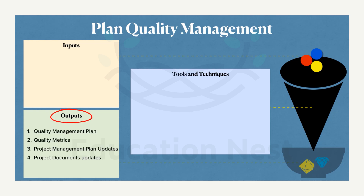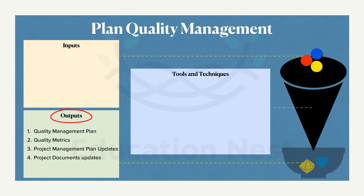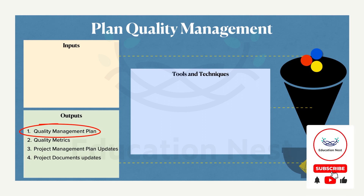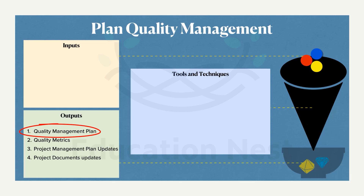Starting with the outputs, we have the Quality Management Plan. As you can see, this is a component of the final project management plan. We have 10 components in the final project management plan, and the quality management plan is one of those 10 components. Through this process, we create a quality management plan.